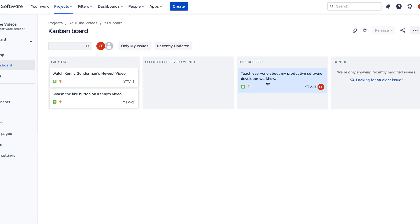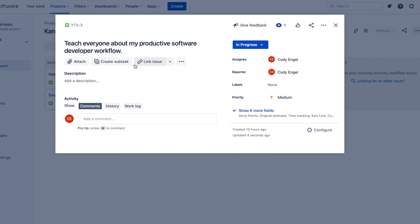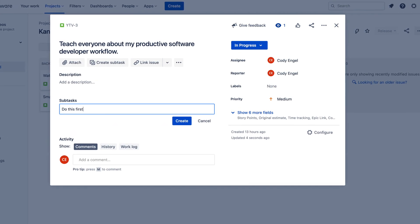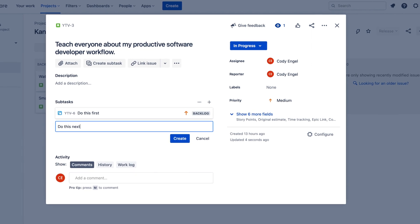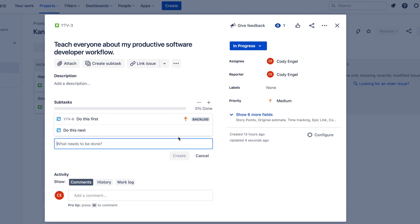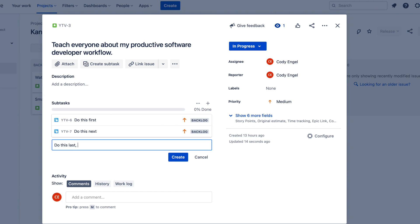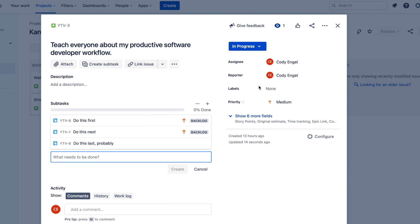If the story itself is a larger story, I will break it up into subtasks. Generally, if it's a five-pointer or below, that's usually small enough where I won't break it up into subtasks. But if it's a larger story I will break that up into subtasks just to make sure that I'm able to continue moving forward on the task at hand.